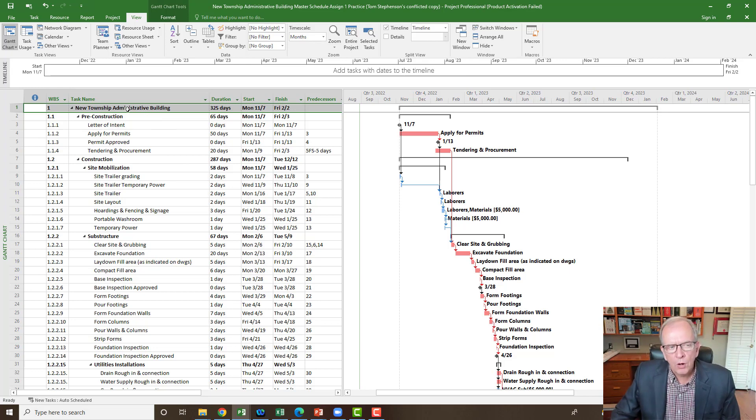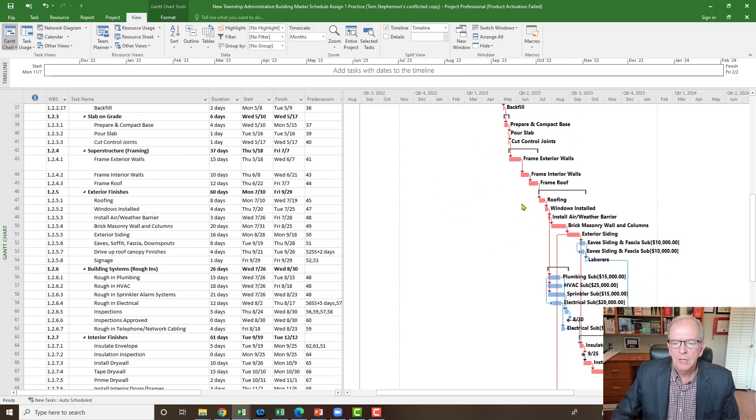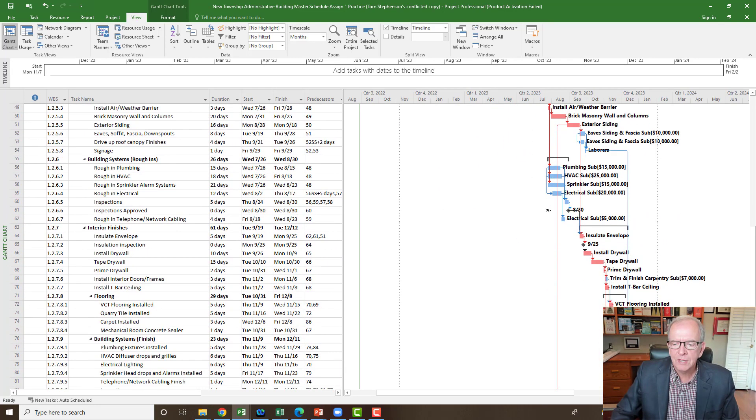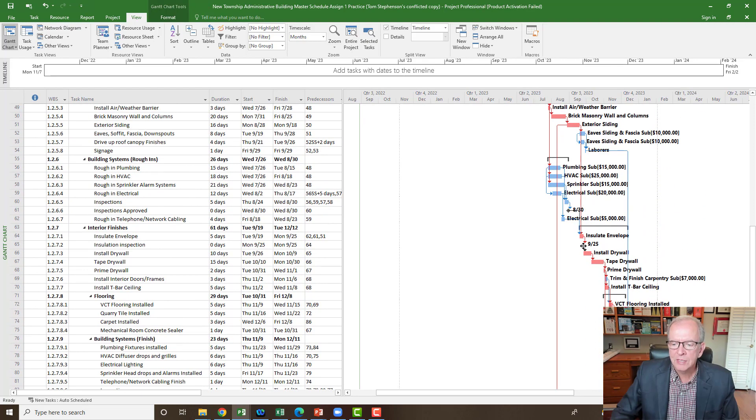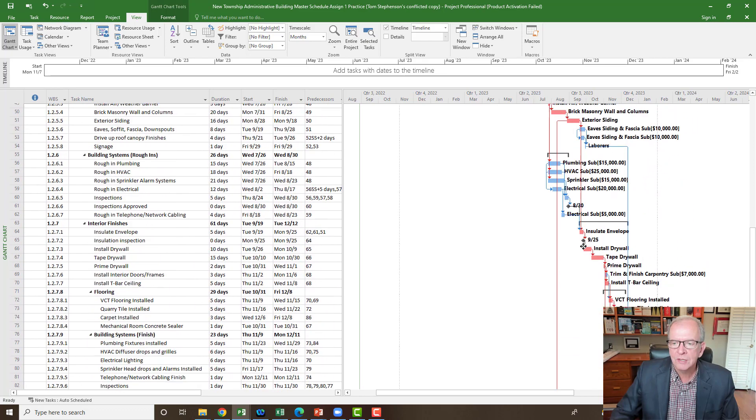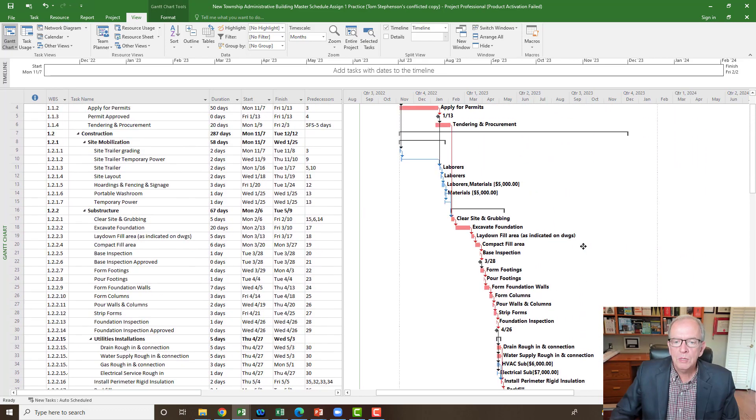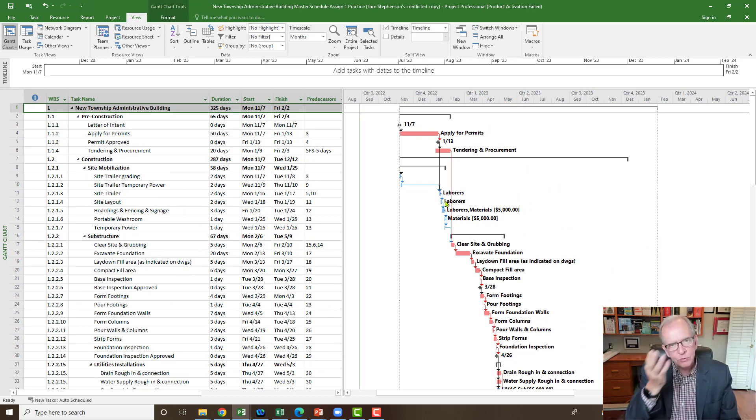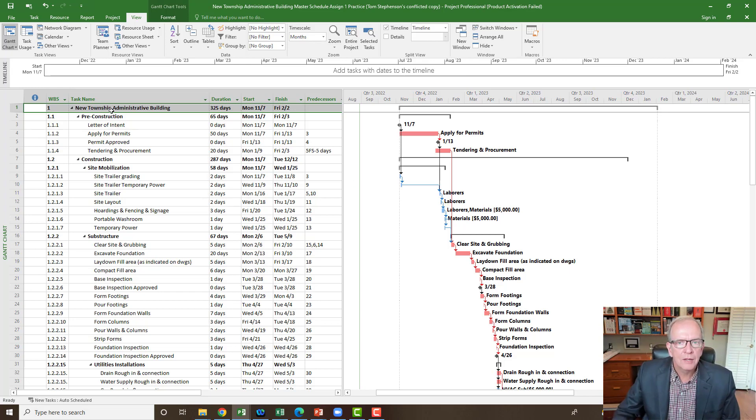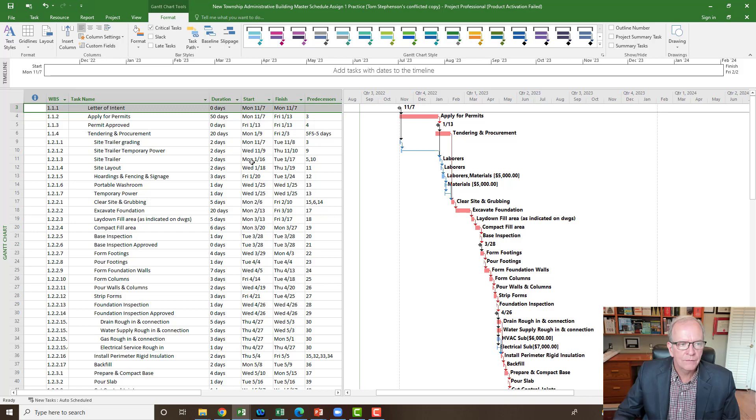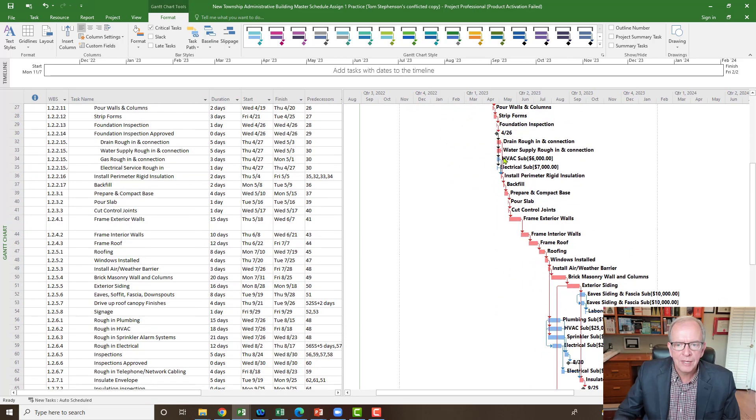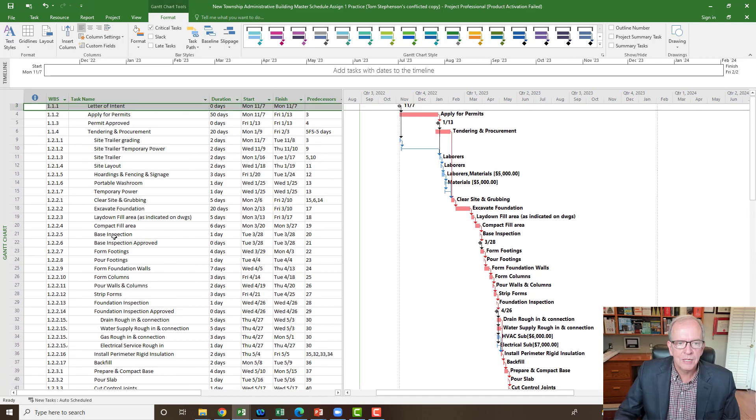Sometimes our summary tasks actually can get a little bit in the way of reviewing our project. Like sometimes we have stuff that's up here, and we have stuff that's at the same dates down here. So like here and here. And it's kind of far away from each other, so it's not necessarily in order. Well, maybe we'd like to review our project more like a waterfall, like as things are occurring, that sort of waterfall effect. And to do that, we might not want these summary tasks. So we can also filter them out by just going to Format. And see over here? Summary tasks. We can turn them on and turn them off. So I just turn them off, but I still don't have that complete waterfall effect that maybe I would like to see going through the project.